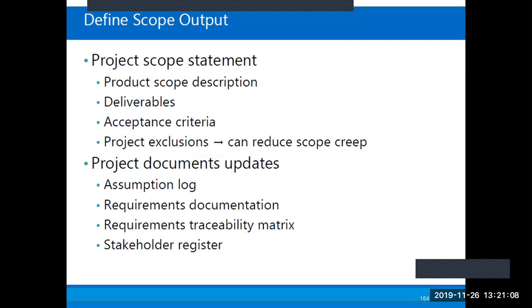So the project exclusions are to guard against scope creep. Scope creep is the phenomenon of uncontrolled expansion of the project scope. Uncontrolled. It is not tied to the scope baseline. So the project scope statement is vital so that you can know what the product and the project really is, and what it is not, and what should not be included. There you have the business.